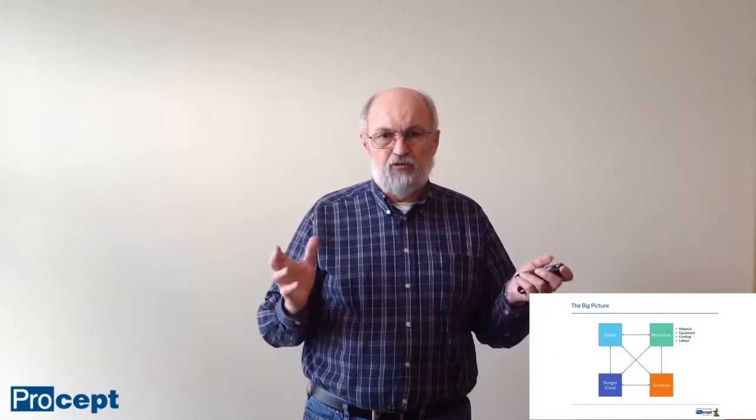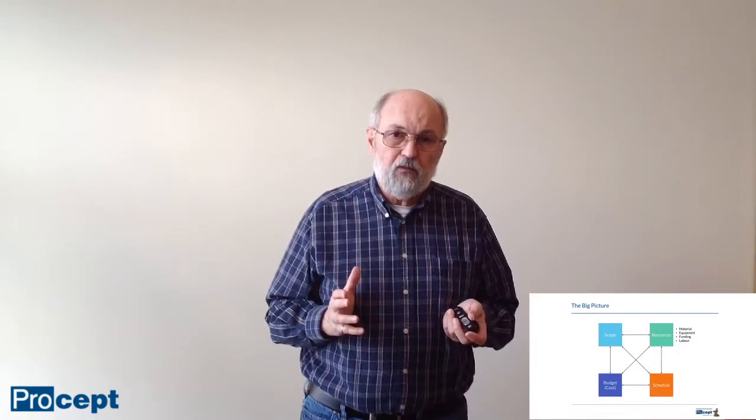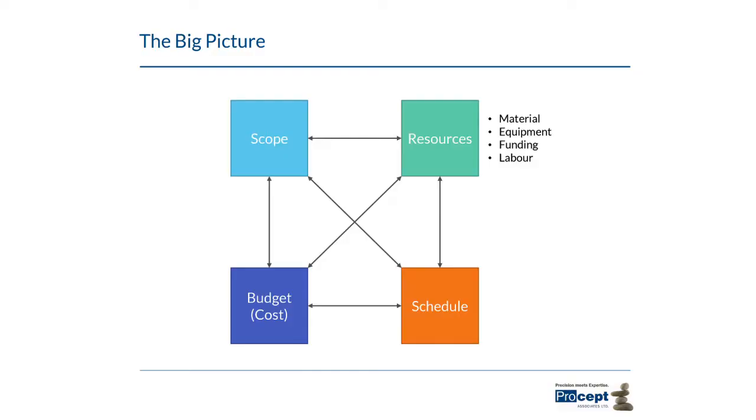We prepared all the scope documentation and the funding documentation for it, and gave it to management. It was in the value of like $7 million. Well, management looked at the risk of not doing it, okay? And then they looked at their spending plan. And then they came back to us and said, well, I can't give you $7 million, but I'll give you 3. What can I get for $3 million? Well, we then had to go back to our scope, schedule, budget, resources, figure out what we could get for $3 million, resubmit the documentation, and got it approved.